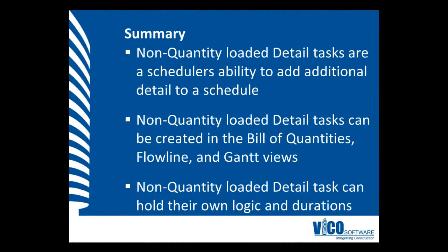In this vignette, you've learned that non-quantity loaded detail tasks are a scheduler's ability to add additional detail to a schedule. The non-quantity loaded detail task can be created in the Bill of Quantities, Flowline, and Gantt chart views. As well as that, non-quantity loaded detail tasks can hold their own unique logic and durations.